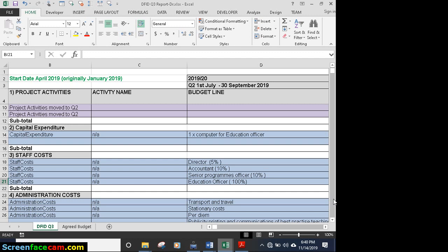The only money that is based on the total project cost is your administration cost. So our administration cost in this project is about £90,000. It's only allowed to be 9,000. So you're supposed to be 10% of the total cost of the project. Okay?